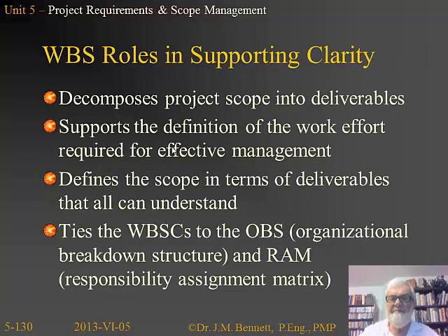It has a big role in supporting clarity, because now we're decomposing the scope, which is general, into deliverables, which are quite specific. So this supports the definition of the work effort required for effective management. We're defining the scope in terms of concrete items that everyone on the team and all the stakeholders can understand. It relates the WBSCs to the organizational breakdown structure and the responsibility assignment matrix.